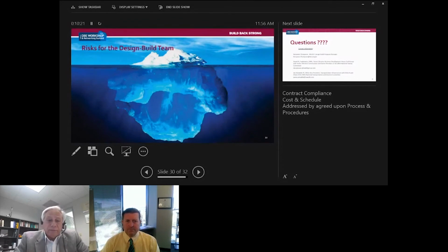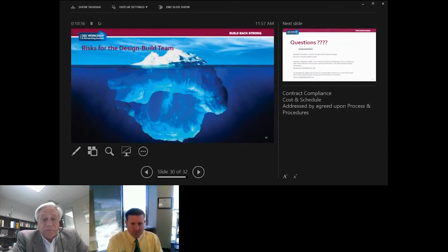If we can develop the most efficient design and make the contractor comfortable submitting their bid based on this 20% set of plans, and we can do it in a manner that identifies any of the potential risks and reduces the potential for high-level contingencies in different items, then we can make the contractor successful, and we are successful in the same manner. But we need to do it while we're also watching closely what the potential risks are and building that into the technical proposal and schedule.